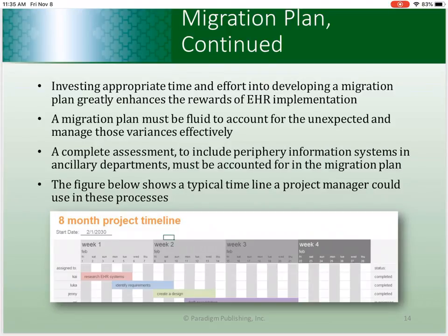But a facility's migration plan must also be fluid. There will be additional specialty software applications, such as those used by pharmacy, rehab, or occupational therapy departments, that require integration into the EHR system. Healthcare providers and staff must assess and add those applications to the implementation plan as needed.